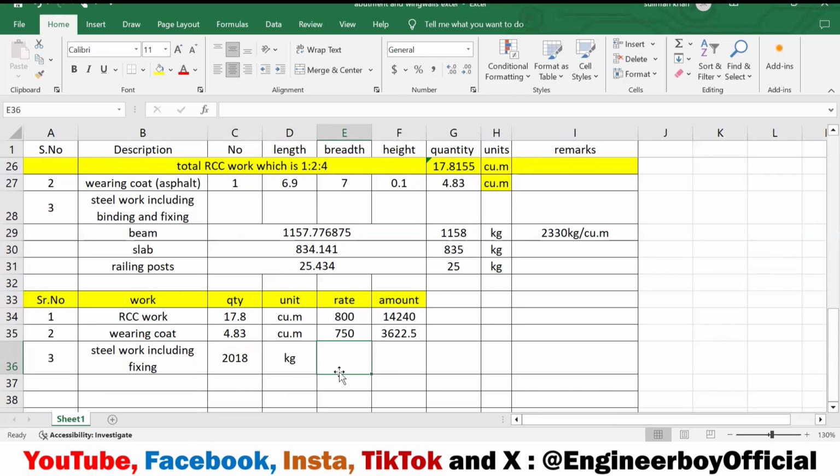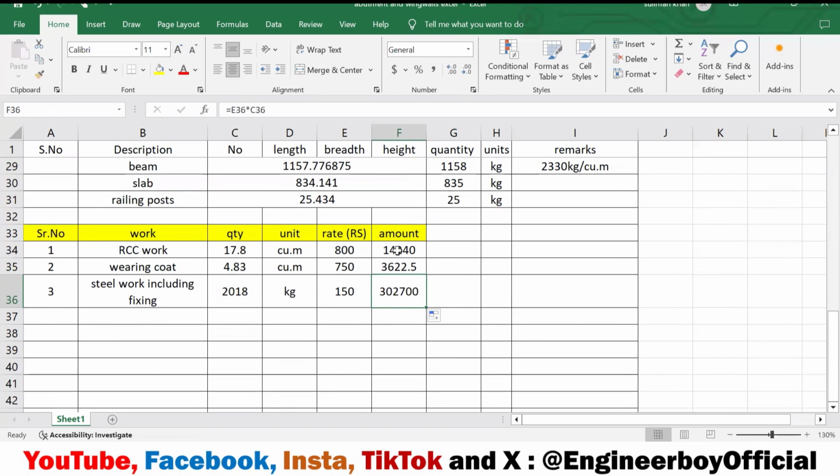That's your work. Now, the rate for the same thing you can find from the MRS. However, let's say I provide the local rate, which is maybe 150 rupees. You can even write RS in brackets there, not in dollars. Now, what should be the amount? Of course, we can drag the formula. It is the same thing, multiplying these two. So for the total amount, we can sum the above three, and this is the total in RS. Okay, is there any question now?